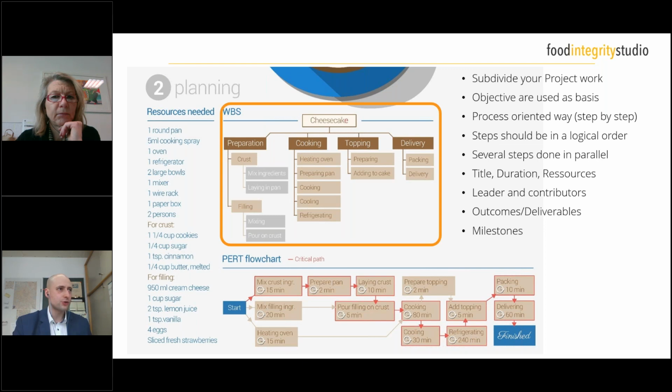And under that, we have so-called sub-work packages, or what other people also call tasks. In correct project management terminology, these would also be work packages, so those are sub-work packages. And as you can see here, we have all the steps which are required under the four main work packages. A very important thing is to always give those work packages a very descriptive title, so that everybody who is seeing the plans, for example somebody from your team, clearly knows what this work package is all about.